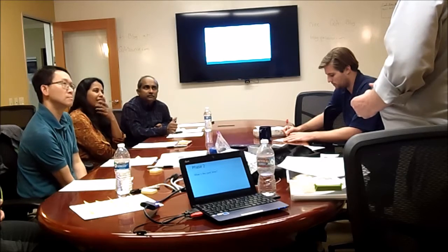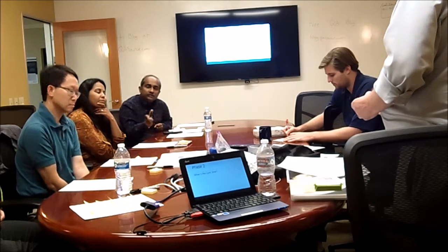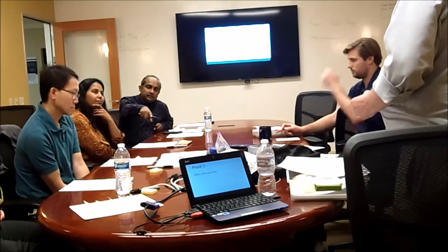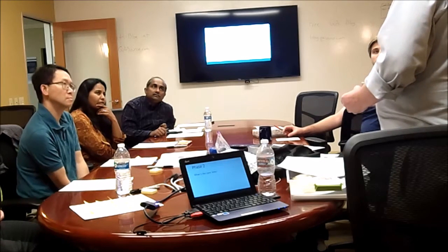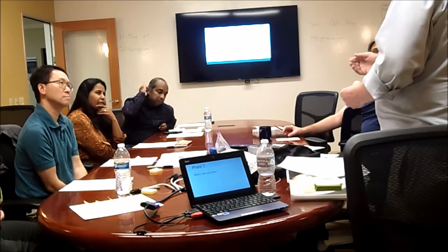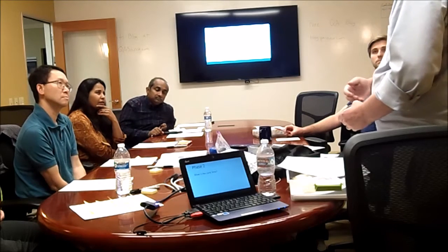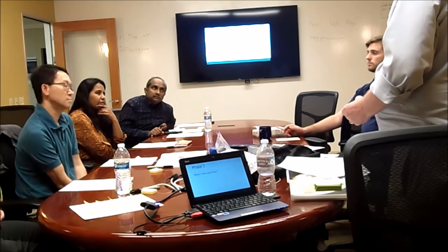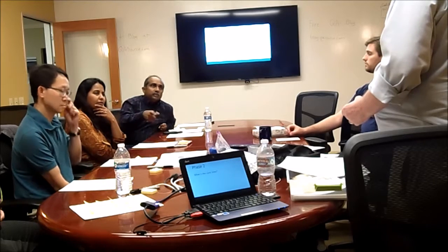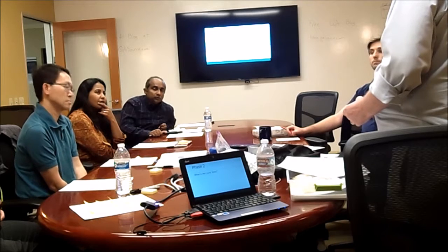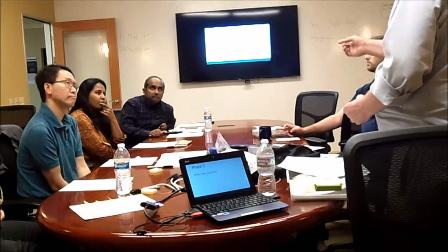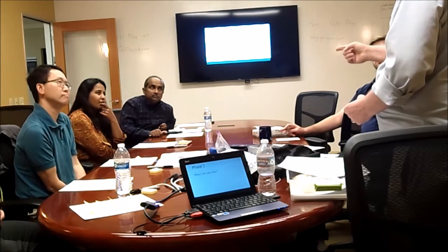It would still be growing, right? No, because she's waiting. No, I'm talking about the first time we did it, when it was piling up. Yeah, it would just keep going. So if you keep running that and things come into the system faster than they come out of the system, what happens? A lot of work in progress would pile up. And does the work all get done then? No. So you have orders that come in, or features that come in,